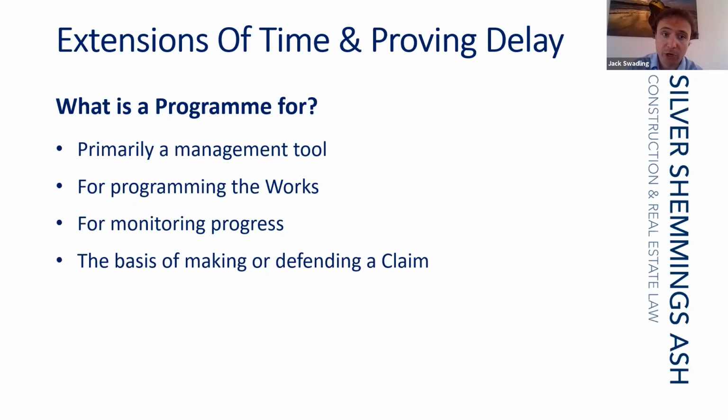So, quick note on program. Generally, well, certainly under the JCT form, the program is not a contractual document. It's a management tool. It's planning of the work at the outset. It's for monitoring the progress of the works, and it can play a very important part if seeking to obtain an extension of time or claim for loss and expense.